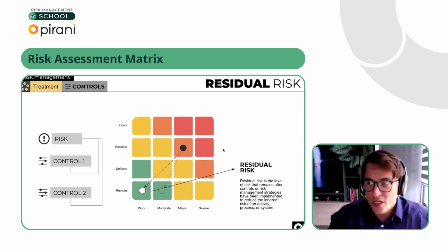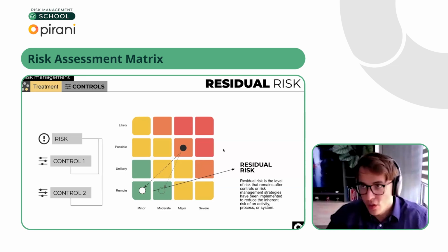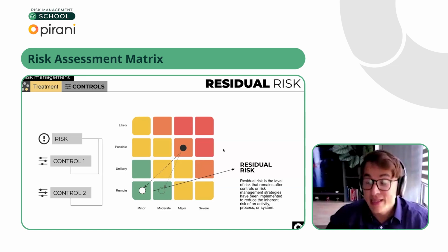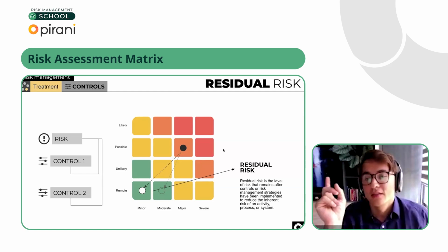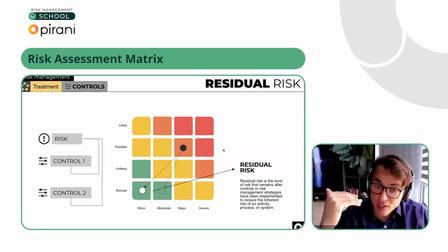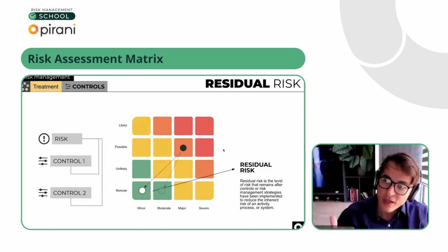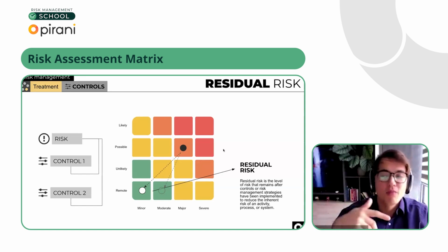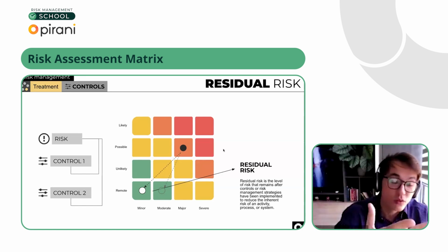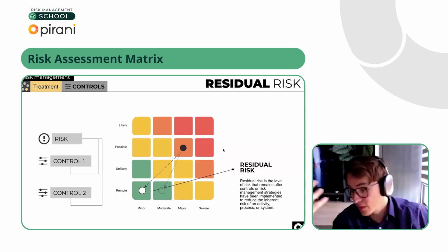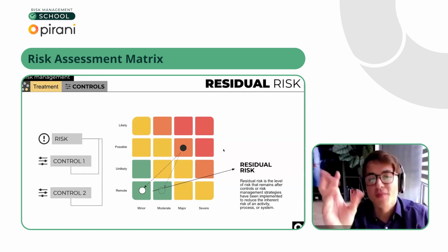The initial risk rating will be the inherent risk. And after, we want to work with some strategies that, again, is not only one. The best thing that you can do is to have layered control strategies. Maybe one to mitigate, maybe one for loss prevention, maybe one to reduce impact, whatever.